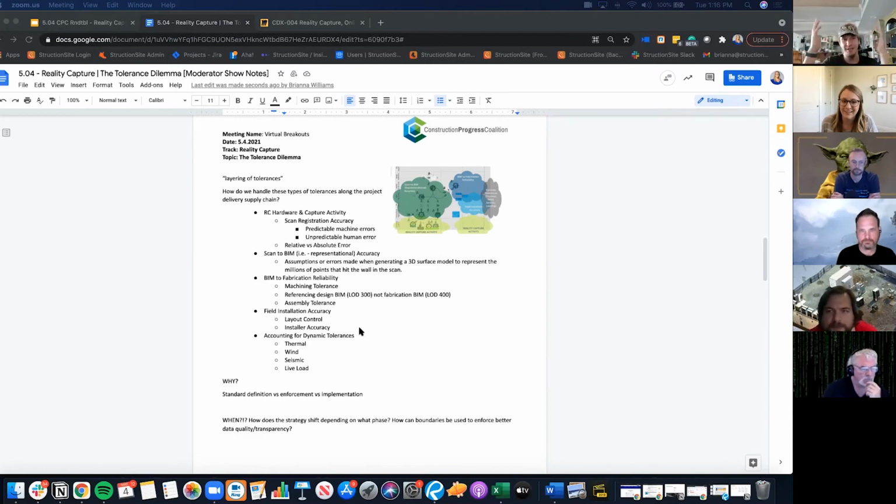I've seen columns that are 7-8 inches out. One of our demo exams, back when we were beta testing the Verity software, which has the purpose in life of checking installation accuracy, we were like, there's columns missing. They literally forgot to install a column. And now we've seen that on 2 jobs, not just 1. We thought we were going to be telling people something was a half inch out. Instead, it turns out most of the value in the software is finding what's missing.